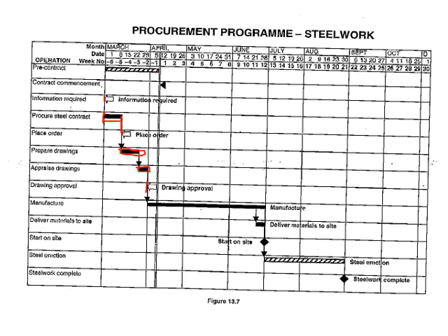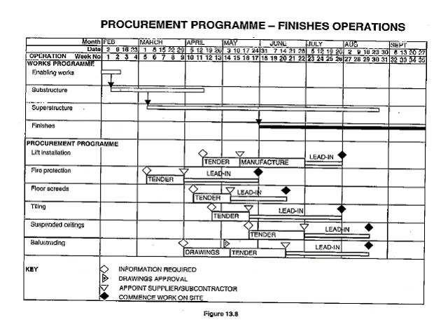Okay, and then you've got a manufacturing time which starts here. The previous one, that commencement was actually this date when it had to commence, but that was for the manufacturing. The actual erection only starts here, so start on site. So you see there's your stage gate, you have your delivery time there, and then you've got your actual steel erection there and steel completion there. Okay, so very straightforward procurement program.